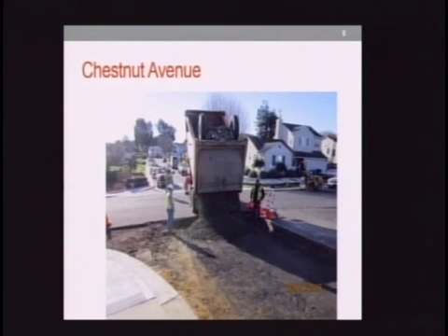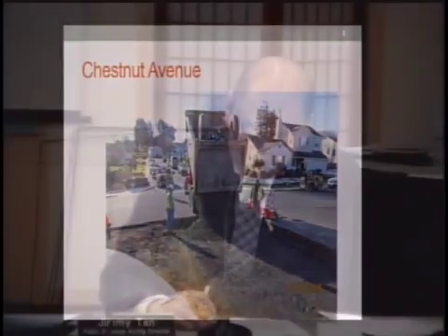Since the existing subgrade conditions were unknown, the additional mitigation work was not included in the original bid, and the situation was considered an unforeseen condition, which required issuance of a change order to Gallagher & Burke. The change orders for the additional out-of-scope work total $515,800, and staff is requesting an additional appropriation to cover these unforeseen change orders.